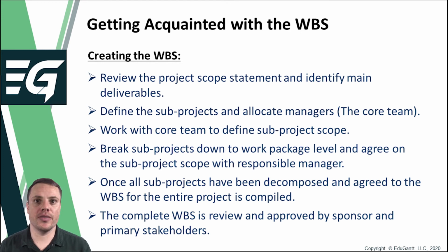Once each of the sub-projects have been sufficiently broken down and all work packages have been identified, all the information is combined to form the work breakdown structure for the project. The WBS will, just as is the case with the requirements documentation and the project scope statement, have to be reviewed in consultation with the project sponsor and relevant primary stakeholders to ensure that everything is accounted for.